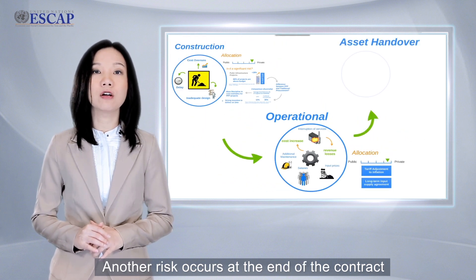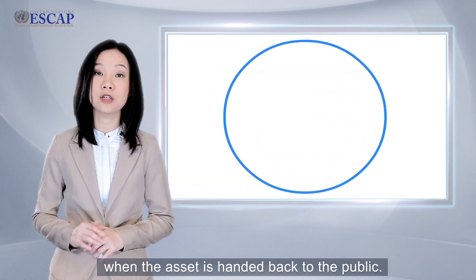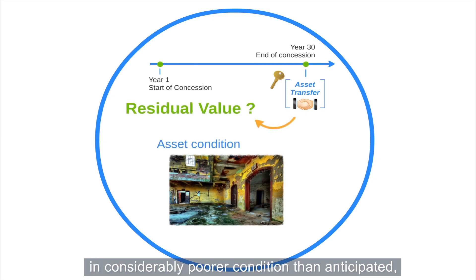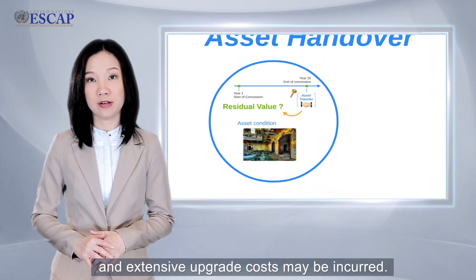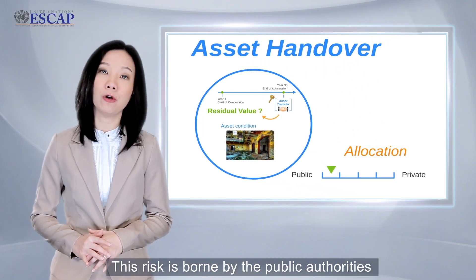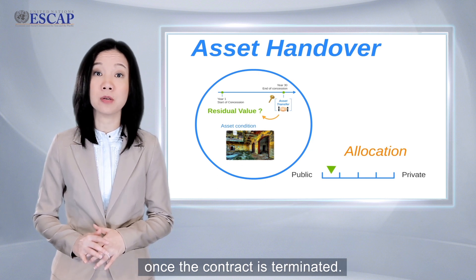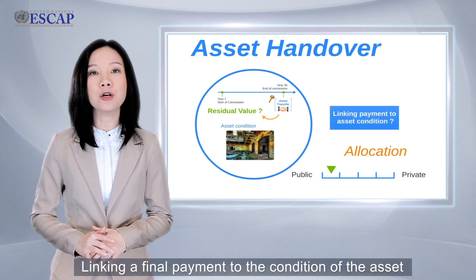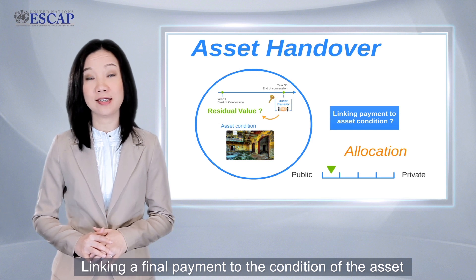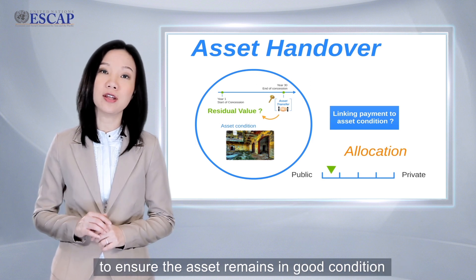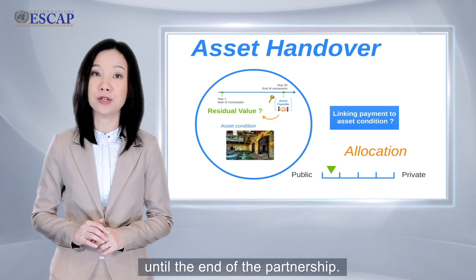Another risk occurs at the end of the contract when the asset is handed back to the public. At that time, the risk is that the asset may be in considerably poorer condition than anticipated, and extensive upgrade costs may be incurred. This risk is borne by the public authorities if they decide to operate the asset once the contract is terminated. Linking a final payment to the condition of the asset can incentivize the private partner to ensure it remains in good condition until the end of the partnership. The contract can also stipulate required standards the asset must meet at the time of transfer.